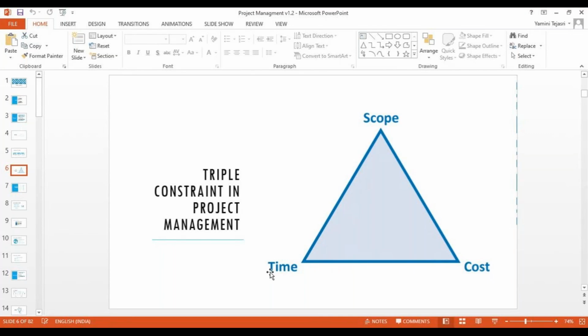That is, if you have decided on a 6-month project and the scope increases, either you push up the budget and finish in the same time, or if you are not able to get more budget or more resources, then your time will extend. As simple as that. A 6-month project might take 9 months, right?